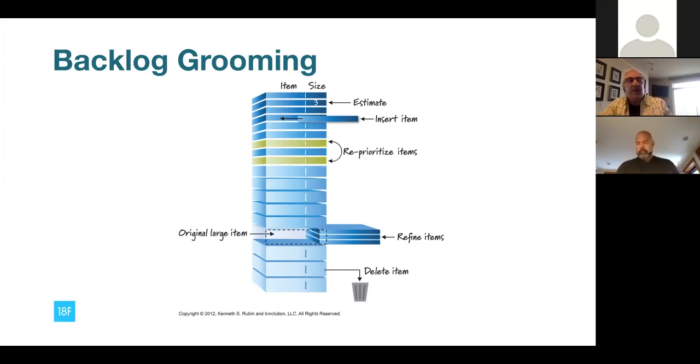It's all about making sure the backlog is clear and clean and ready for the next sprint planning meeting, with particular emphasis then on the top of the backlog where the highest priority items are, because that's where we're going to concentrate when we get into planning for the next sprint. So most teams will do one of those meetings per sprint. The team I'm working with now has chosen to do two, and it's because they needed it. They started with one and they just needed more, and it's all working quite smoothly. So, if your team needs to do that, that's just fine.